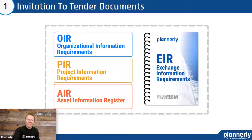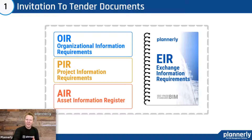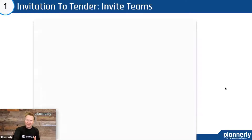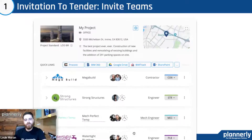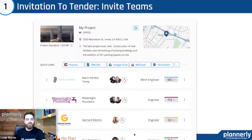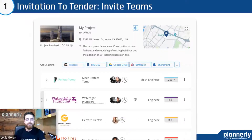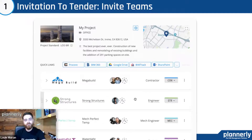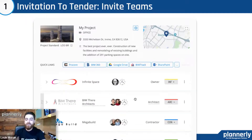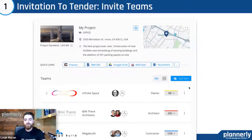For the invitation to tender, you put together the organizational, project, and asset information requirements into an exchange information requirement, which becomes the tender documentation. Within the platform, you can set up teams to assign responsibility for certain sections and invite team members with specific permission levels so they can see sections that are ready for them to review.